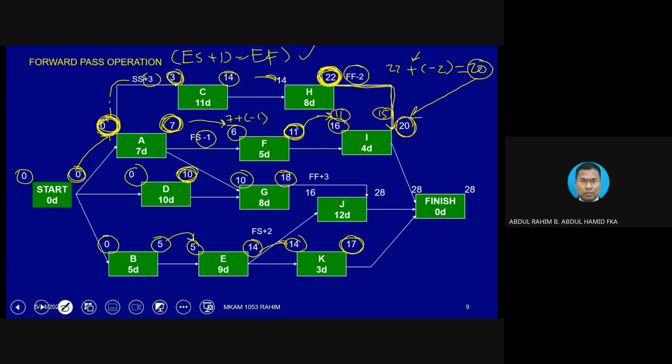If it is 20, then what is the starting of the duration? So we work backward. 20 minus 4, so we must basically start with 16. 16 plus 4 is equivalent to 20. That is the matching value, okay? And you notice that this is one alternative, whereas the top one, 11 and 15, is another alternative.